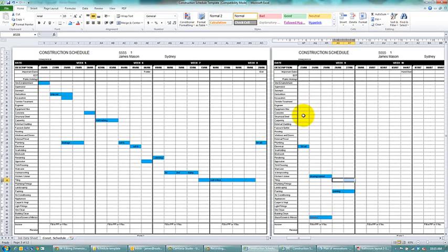It'd probably take me a good half a day or a day to map out the schedule, speak to the trades, speak to the suppliers, work out what the lead times are, and get everyone booked in for dates. The reason we do this is just so that you can be organised, you can have your trades turning up at the right time. You're not calling them the day before to say, look, I'm not going to be ready for you for another couple of days, and then the problem could be that you lose the guys for another week because they have to go to another job, and then the job just ends up blowing out. So it's all about being organised and what you can do to schedule things in.